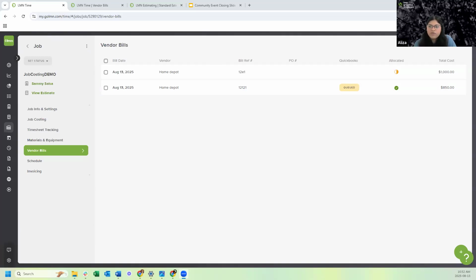We're in the habit of just using the total dollar amount of materials as line items on an estimate. Example, plant materials, 1,000. Yes, that is an acceptable practice if you have a large amount of materials that are essentially the same. So if you have $1,000 for those plant materials, you can use it that way as well. The reason I did it the way I did it is because I actually want to know for my company how many flowers, how many bushes, how many plants I used for this job, for more accurate reporting and job costing.